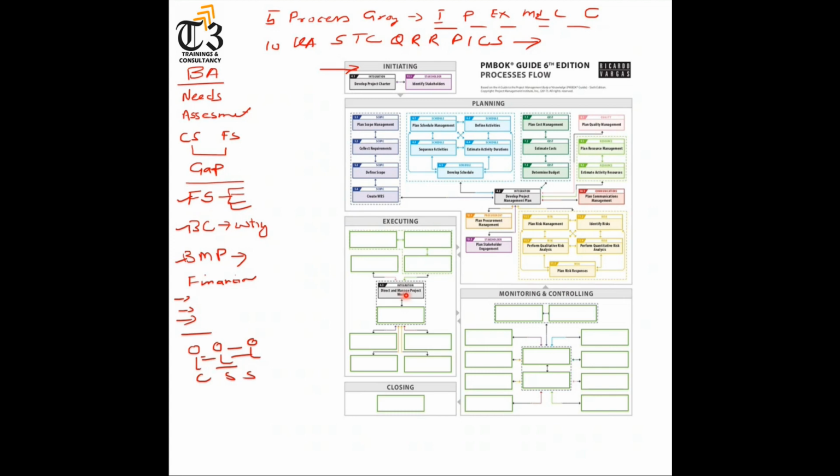And if we have issues, we'll put those issues in the issue log. And to help solve the issues, from the first day we start collecting lessons learned with the process called manage project knowledge. In manage project knowledge, we collect the lessons learned in the lessons learned register. And once the project is finished, we upload it into OPA, in the lessons learned repository.